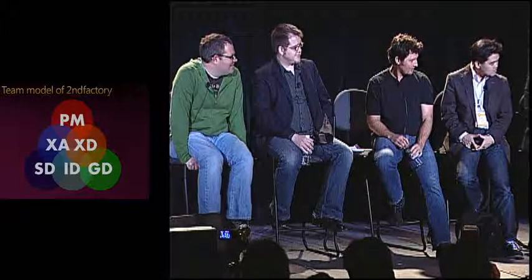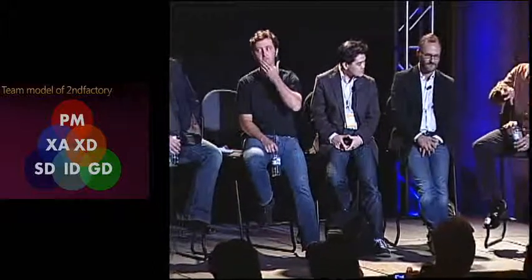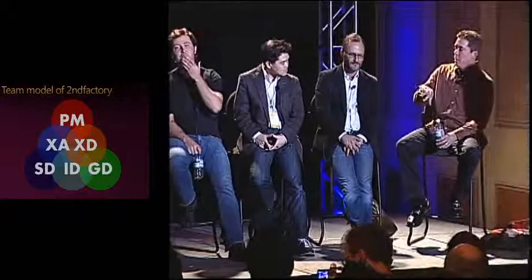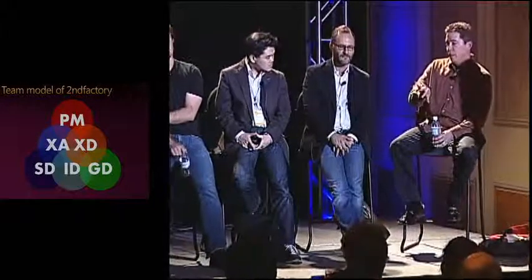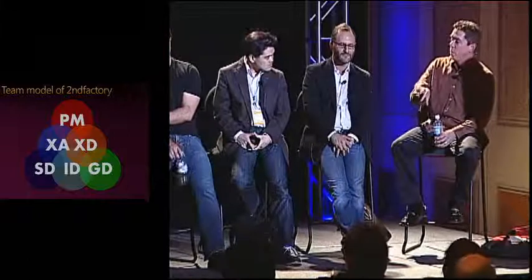Yeah, one of the deliverables that comes out of these teardowns, or I call them deconstructing, I like the more technical term, it sounds cooler, is a control inventory, where we rate the level of complexity of base controls and composite controls. We're all doing our own assessment of how hard it is to visually skin it, theme it, build the interactions and triggers. We're talking WPF, XAML, Silverlight stuff. And from a technical point of view, what's the integration complexity?